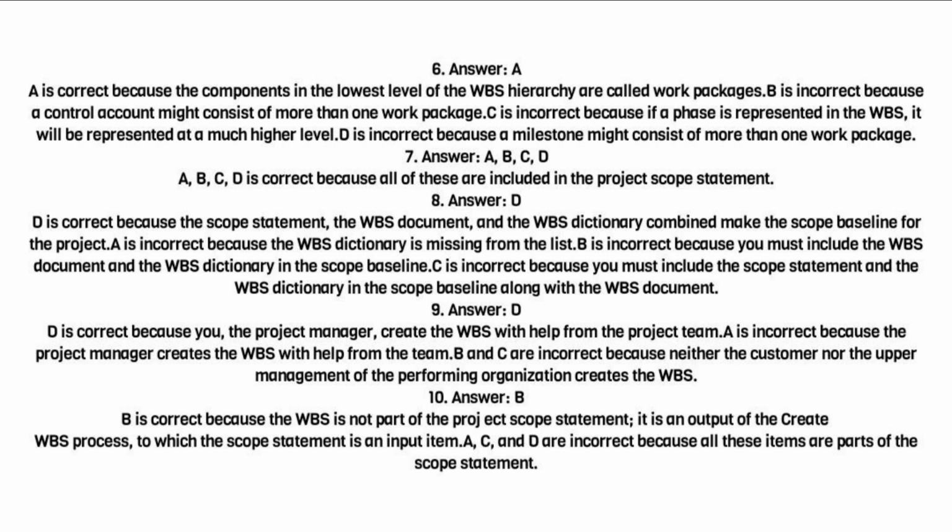10. Answer. B. B is correct because the WBS is not part of the project scope statement, it is an output of the create WBS process, to which the scope statement is an input item. A, C, and D are incorrect because all these items are parts of the scope statement.